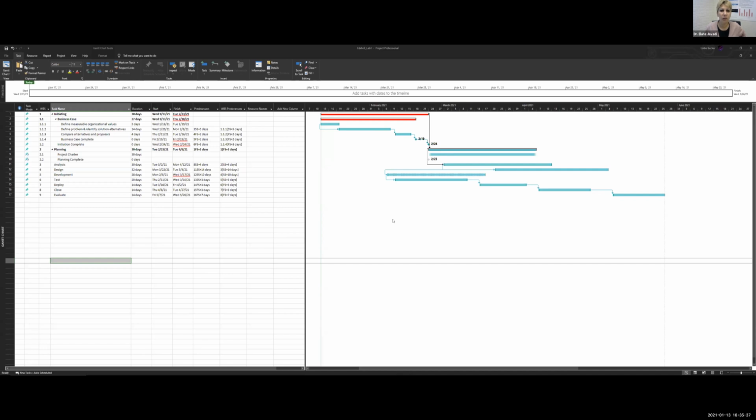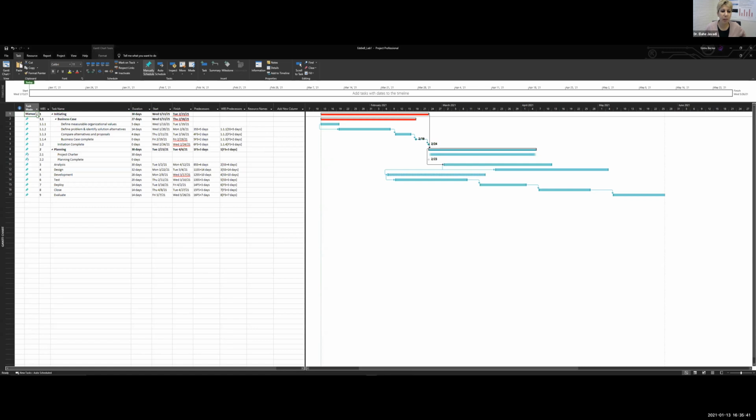Did you give me control? Yeah. Okay, then here, this is a problem. That first step to make sure everything is auto scheduled, you missed that step. And the step is when at the bottom of the page there is a bar, and here, this one, you should have changed this to auto schedule.